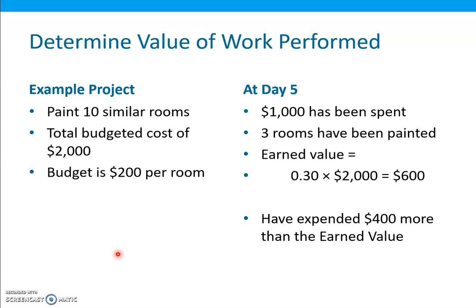So consider a project for painting 10 similar rooms over 10 days. That means one room per day, for a total budget of about $2,000. So that means if there are 10 rooms, the budget per room will be $200.